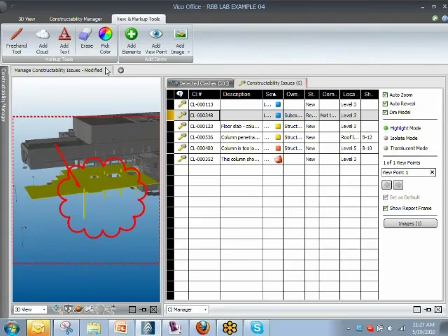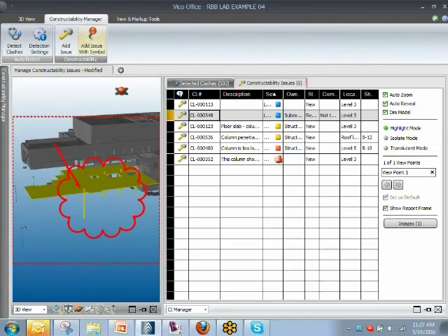And it's not just clash detection, it requires knowledge of the construction process too. So everything that is not in the 3D document, where you have to make an assumption and something goes through the report. Right. That's something you can include in clash detection. Correct. So not all the issues that may exist in the 2D documentation will be caught by clash detection.